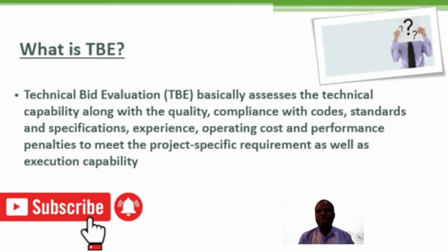So this MR document, this material requisition document, is prepared and sent to vendors, stating the requirements for any item on a specific project. So based on their experience, based on the vendors' availability, different vendors will therefore provide their bids, they provide their offers.